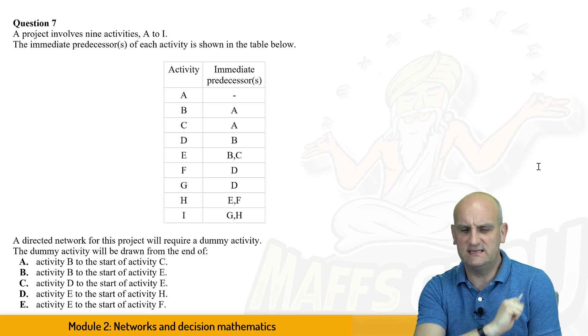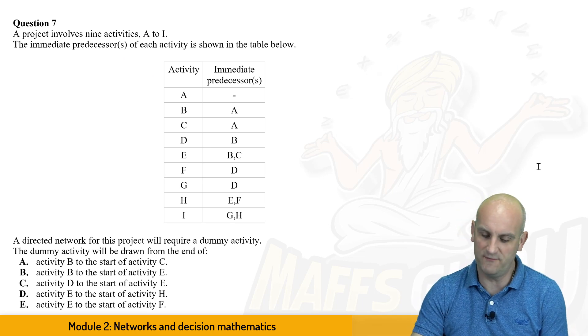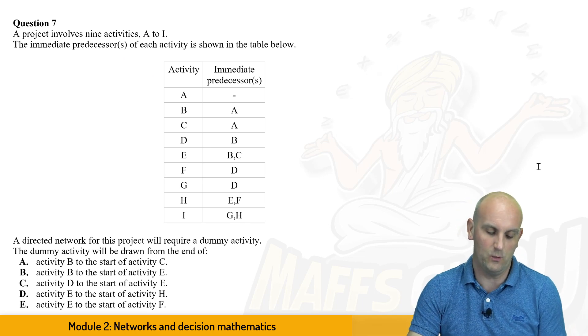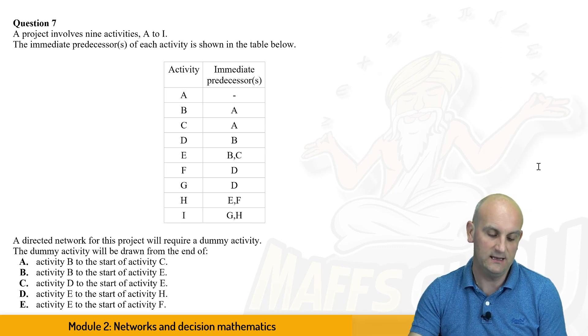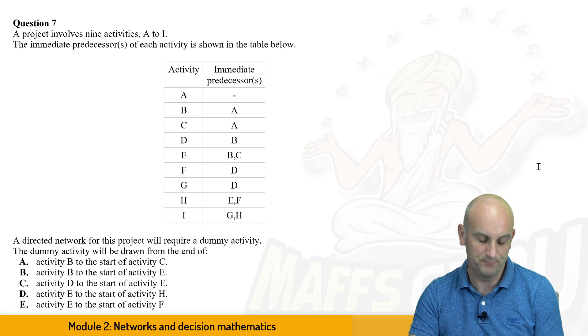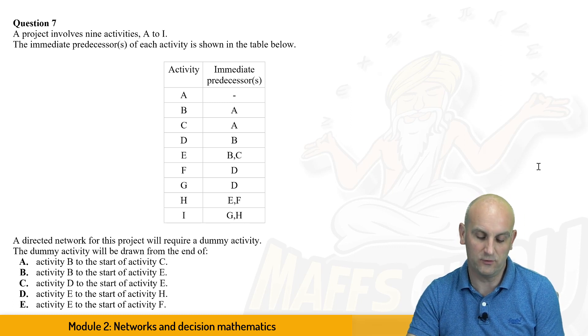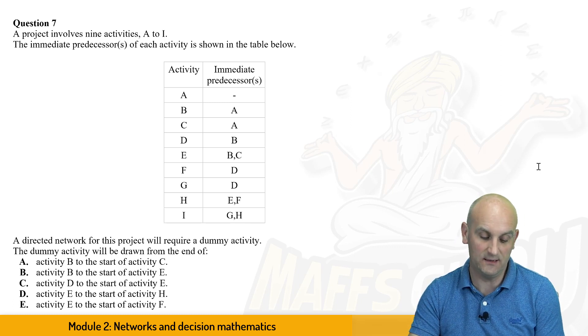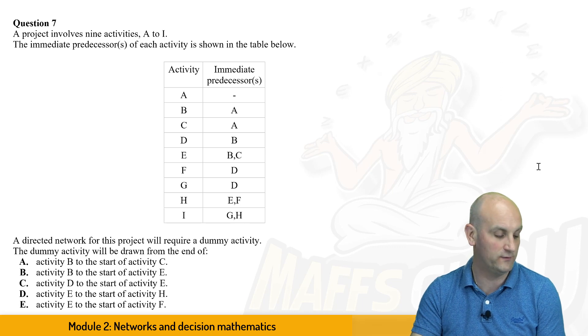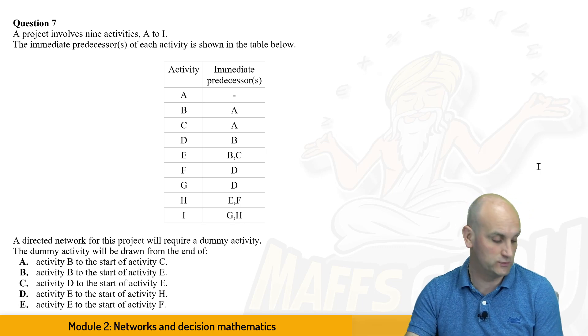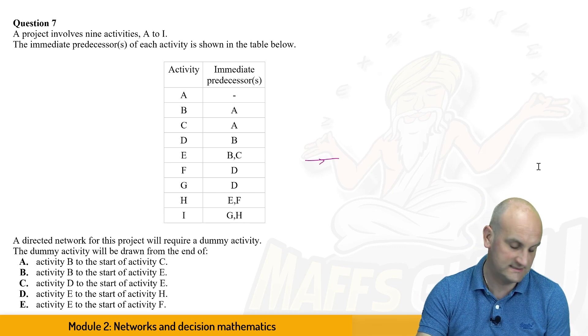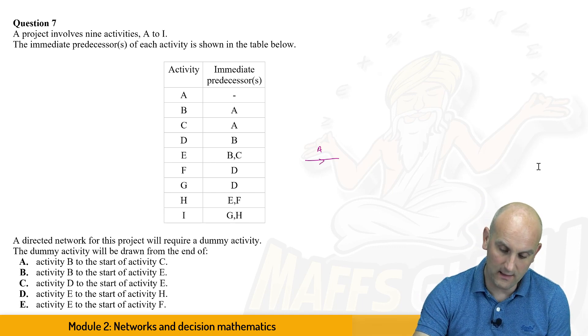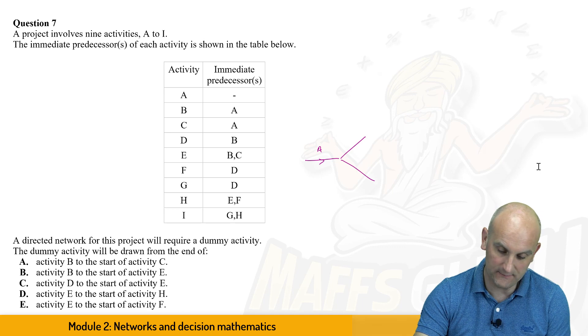And so, for some reason, my scanner would not scan this question, so I've had to type it up if it looks a little bit different. Don't worry about it. So we've got a project involving nine activities, A to I, and the immediate predecessors are all shown in this. So a directed network for the project will require a dummy activity, and the dummy activity will be drawn from the end of. Well, the first thing is, what I've done is I've drawn this out, and I know that I've got the start here, which is A, and then I've got B and C coming off of here.